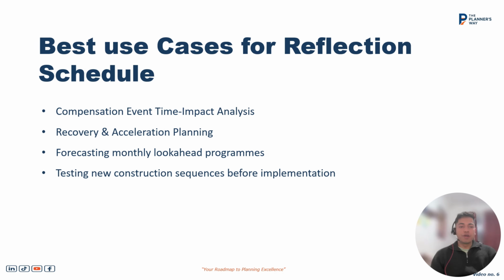Okay, moving forward, what would be the best cases where we can use the reflection schedule? We can use the reflection schedule on any compensation event to look after the time impact analysis. While we need to raise a compensation event, we need to do the time impact analysis on the schedule to look at what impact it has had on the schedule before the CE has been approved. On that instance, we can use the reflection schedule.